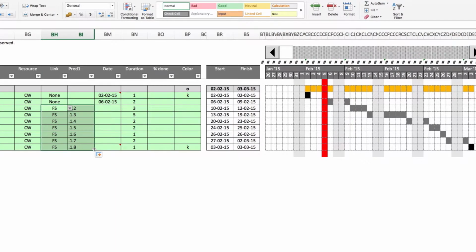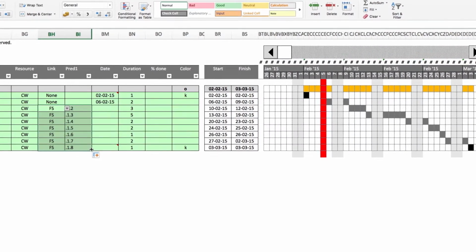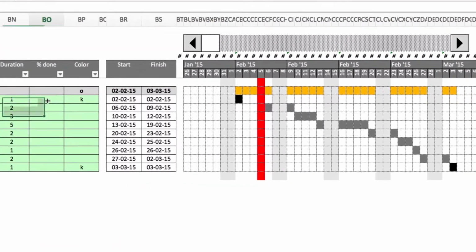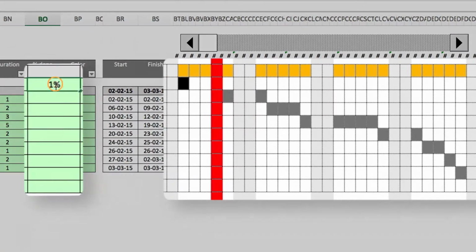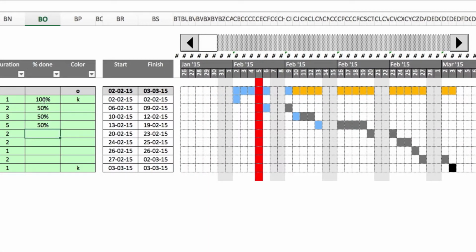Once you have entered the number of workdays and the start dates or links, the end dates are calculated automatically, and Magic-Gantt tells you exactly when the tasks and your project will be done. Once your project has started, you can track the progress on the tasks by updating the percentage complete column in the task rows. In the Gantt view, the Gantt bars will show light blue for the complete portion of your tasks. By contrast, the incomplete portion will be highlighted in light grey.